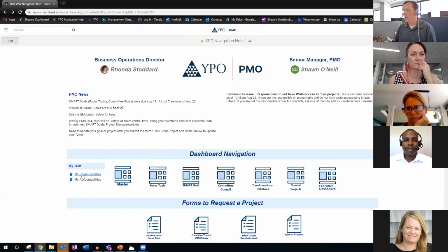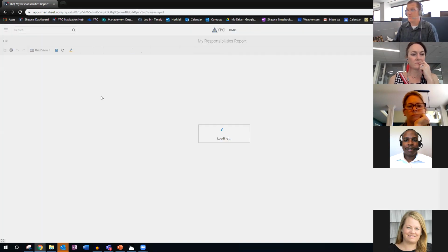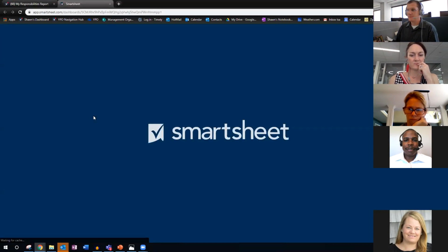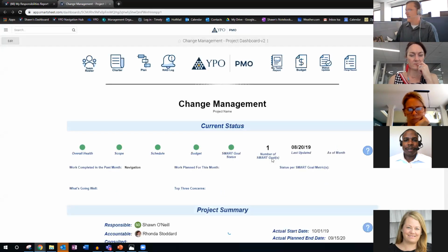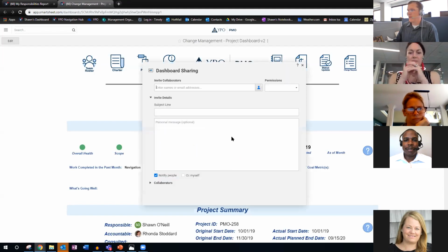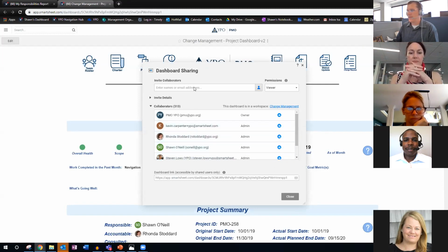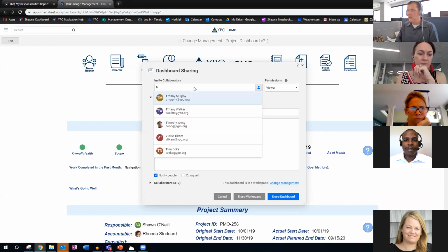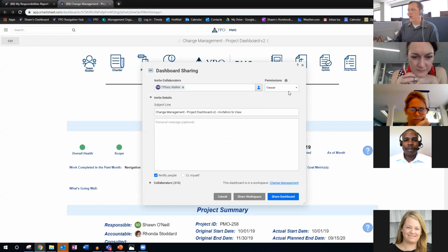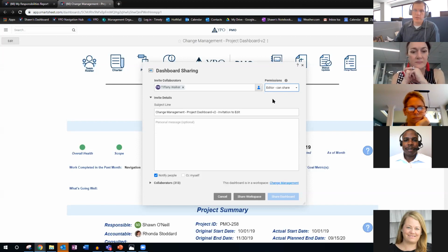Okay, and then we were going to talk about how to share your project. So I'm going to go to one of my projects. Let's go to change management. By default, the responsible and the accountable have the ability to edit these documents, but everybody else in the company, except for myself, has read-only access. If you have a project team and you want them to be able to edit the project plan or all these documents, then you hit the share button. From the share button, you can choose to add them in here. Say Tiffany's going to be collaborating with me on this. I'm going to put Tiffany Walker in here, and then change her permission to editor and can share. Editor and can share means that she can also share it out to people with editor access also.